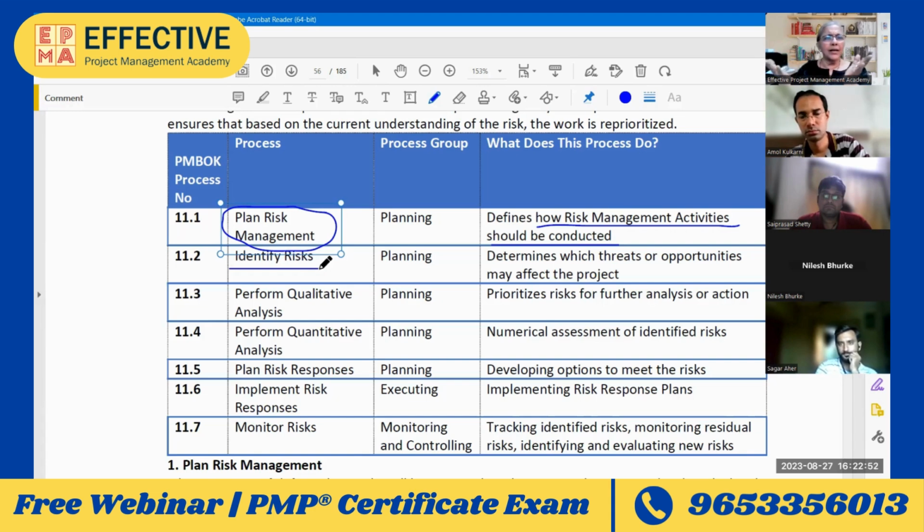How frequently should you be doing it? That's your choice, your team's choice, your organizational practice. Ideally, every 1 or 2 weeks, a risk identification meeting is encouraged. So, every 2 weeks at least, you should consider having one risk identification meeting. What do you do there?